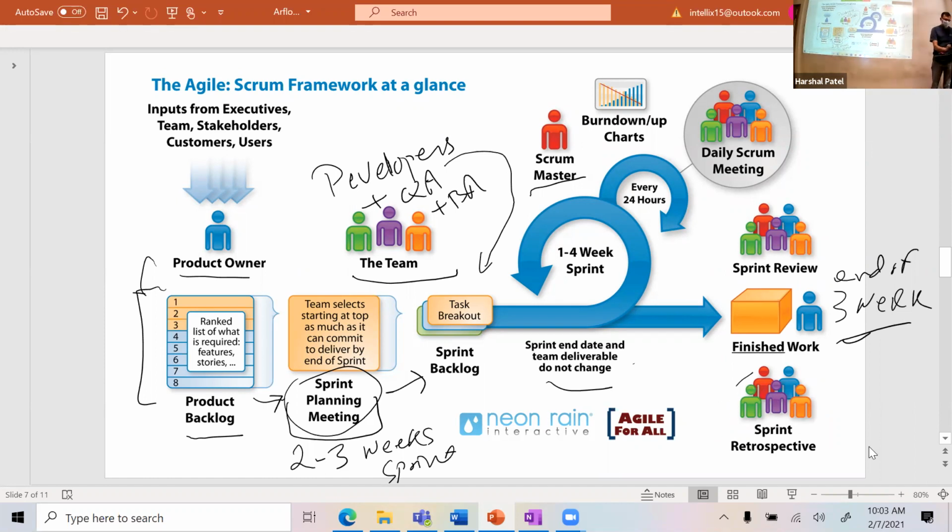And then finally, you have the sprint retrospective. Let's say they could not deliver all the work over 3 weeks. So they will look at why they could not deliver it, maybe there were some roadblocks and so forth. It is all about the team here in the retrospective. They will say, let's do something better, maybe we'll engage the customer upfront and get more details around it. So it all focuses on how we improve in the next sprint so that we can deliver the work more efficiently. It's typically a 15 or 30 minute meeting, and then they move on.